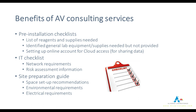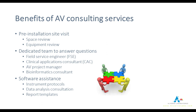Last but not least, the site preparation guide addressed the physical aspects needed for the instrumentation — electrical requirements, environmental requirements, biohazardous waste disposal, and whether anything goes down the drain or requires special setups. This was important because all of this could be looked over and assessed without wasting any time in the actual AV process itself. Having this gave us a good head start on the process.